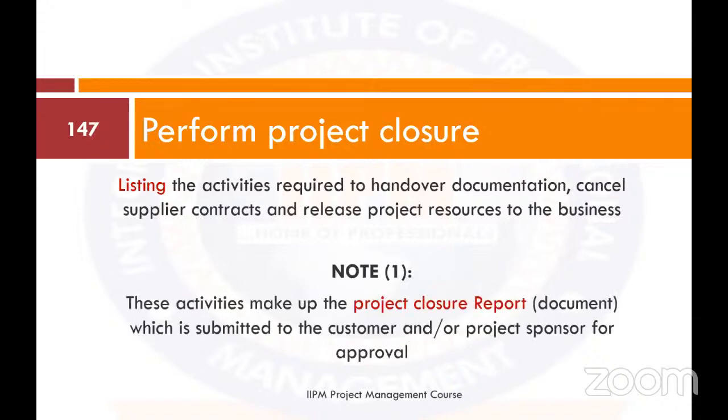Listing the activities required to hand over documentation, cancel supplier contracts, and release project resources to the business. Note, these activities make up the project closure report, which is submitted to the customer and or project sponsor for approval.